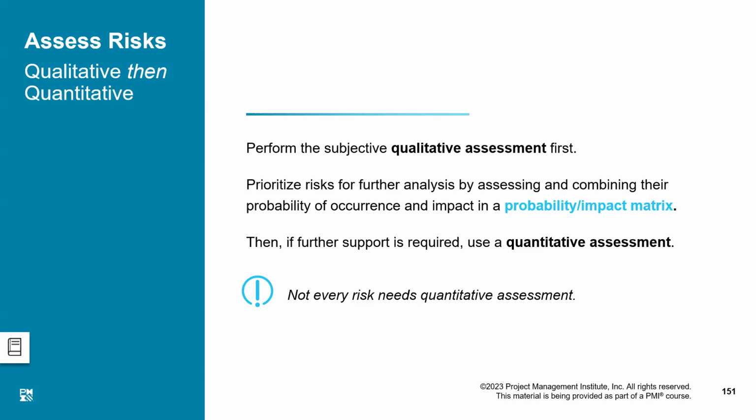We rather start with a broad categorization of risk, which is called qualitative assessment. And we try to sort out those risks which are bigger than others. When I have done that from apparent qualitative assessment, then all those risks which are not coming up to that standard will be dropped down.